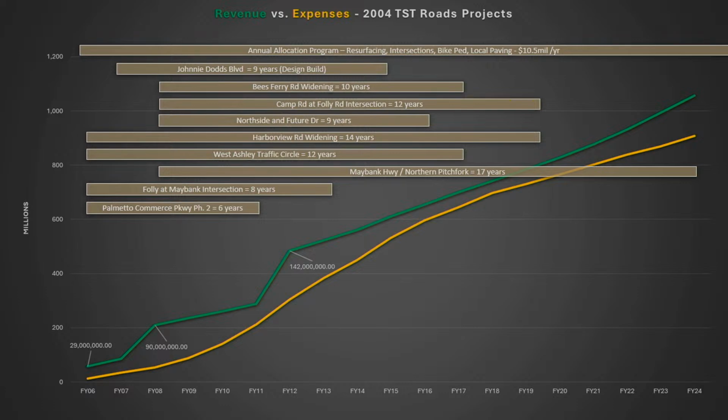We don't really need that cash in the bank, right, because we're paying interest on that. So it's very critical that we try to time our borrowing with the schedule of the projects. We don't want to borrow too early and have to pay interest on money that we don't need to use immediately. Now, obviously, schedules of these transportation infrastructure projects are very complex. Things are moving around. So anticipating when to borrow based on what's going on in the market, it's very complex, but we must manage the cash flow, right?